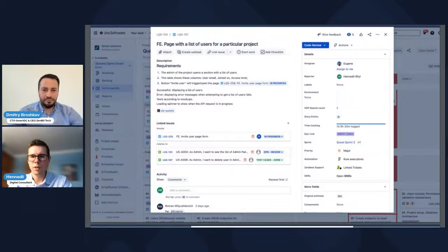And that's how you control them. In regards to time tracking and story points that you can see here, it's very flexible. Some teams prefer to just track hours. Some create story points which can be 2 hours per story point. Somebody says that it can be 8 hours. Somebody creates a different way of calculating the story points. It's up to you, just how you wish.